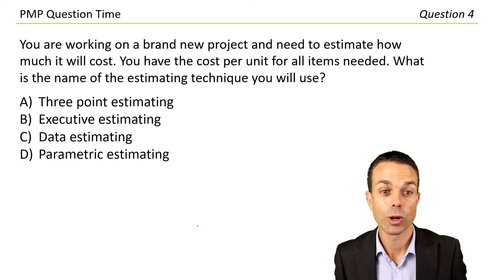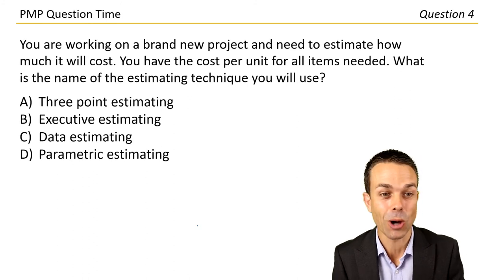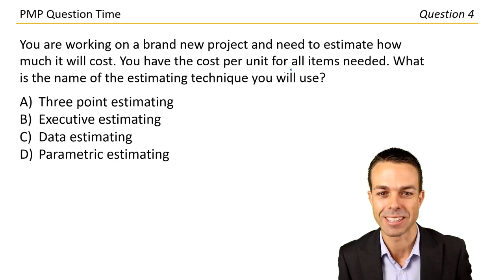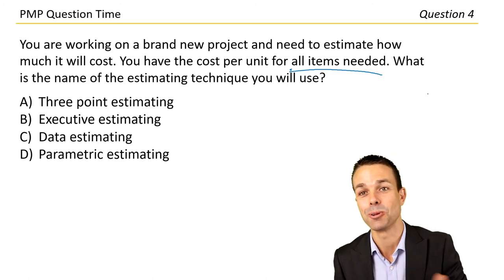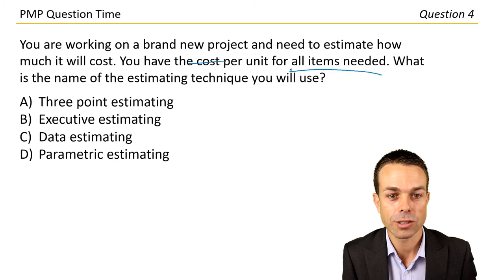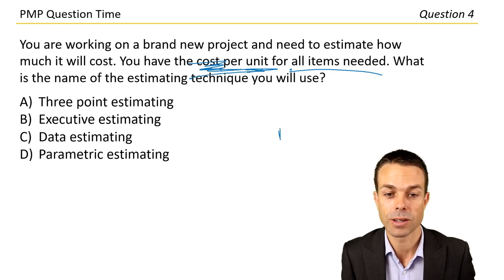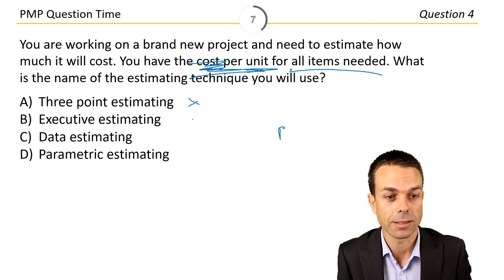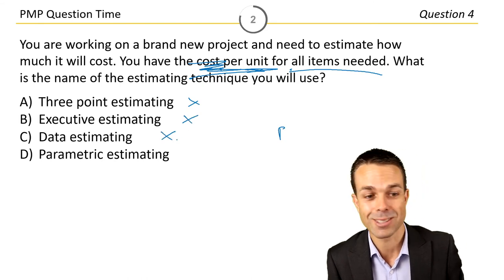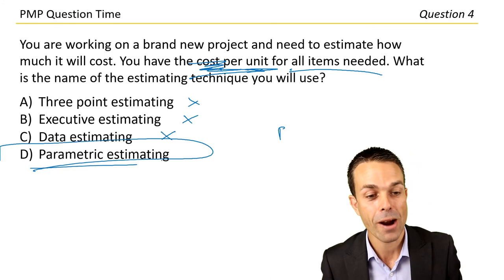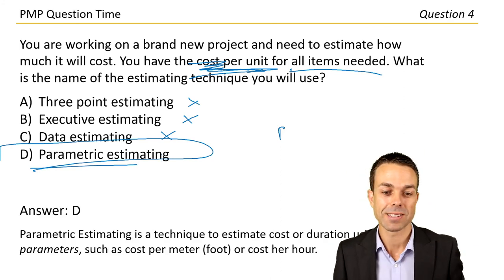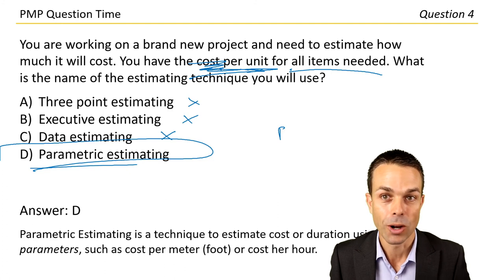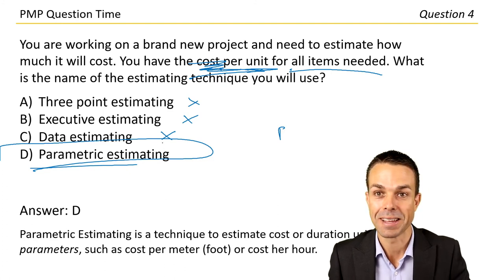Question four. You're working on a brand new project and you need to estimate how much it will cost. You have the cost per unit for all items needed. What is the name of the estimating technique you will use? Cost per unit is a parameter — so we're measuring by a parameter. It's not three-point estimating, not data estimating. Let's go with letter D: parametric estimating. Parametric estimating is a technique to estimate cost or duration using parameters — like $5 per meter or $100 per hour.